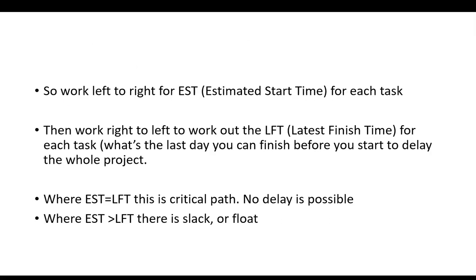Okay. So, as I say, we work from left to right for the estimated start time along the top, and the latest finish time works backwards. Where EST equals LFT, that's the critical path. And where they're not the same, there is slack, although this isn't perfectly true. My second statement is not perfectly true. There, I've put that right for you now.